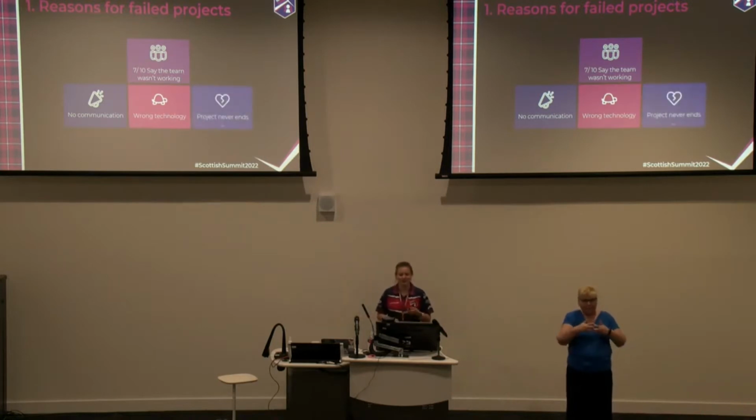And the last one is that the project never ends. If you see that new things are coming, you want to implement everything. So you have a go live date, but then it's like, okay, we'll just push it and put the new things into it as well. So after 4 years, you figure out, did we actually finish this project? Oh no, we're still in project mode. Everyone is still working. Wouldn't it be time to actually call it quits? We're done here. But it also requires that there is someone actually overlooking the process.